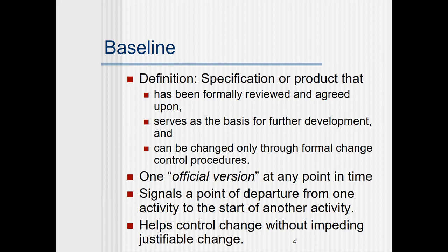We need to properly specify all the new changes that are going to be accommodated into that configuration of the system. It has to be taken to several people for their acceptance. Only then can you go for doing the change in terms of your development tool, your programming language, or reporting tool, or whatsoever it may be. It should be a formal change control procedure which has to be conducted in order to make the change to the product. So this is the basic definition of a baseline.